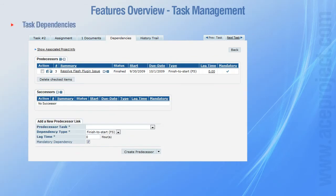Task dependencies can be set between tasks. Each task can be linked with other tasks via the Finish to Start dependency type, which allows each task to have predecessors or successors.